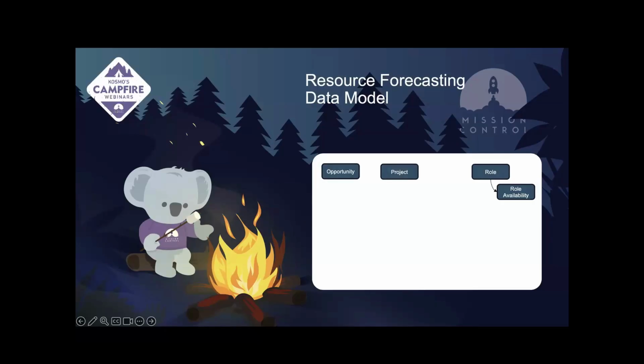As we take a look at the role's demand, we can see that this comes from the projects and also the opportunity, the amount of things that are taking up the individual's time. We can take a look at projects as the committed work, the things that we've sold and need to deliver upon, whereas opportunities hold the forecasted work, what we think we will sell and what will eventually need to be delivered.